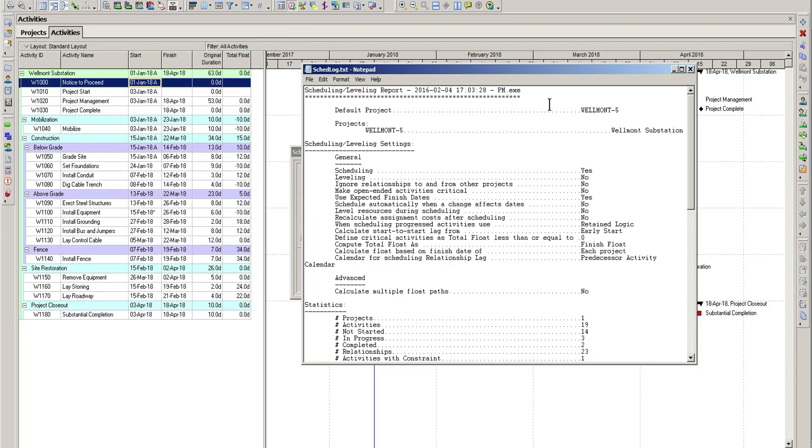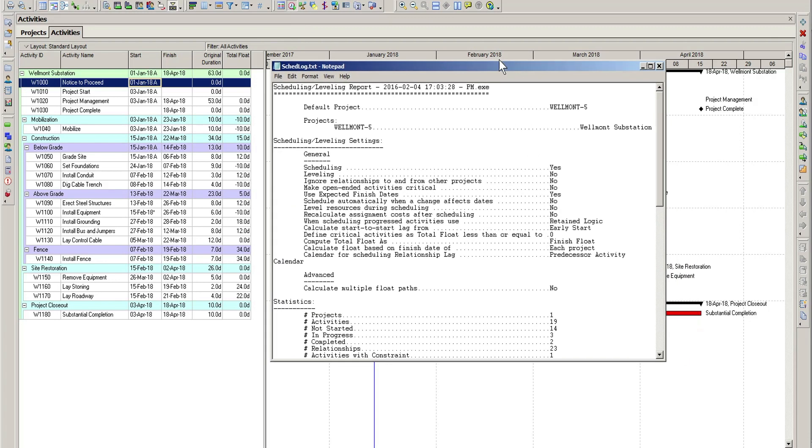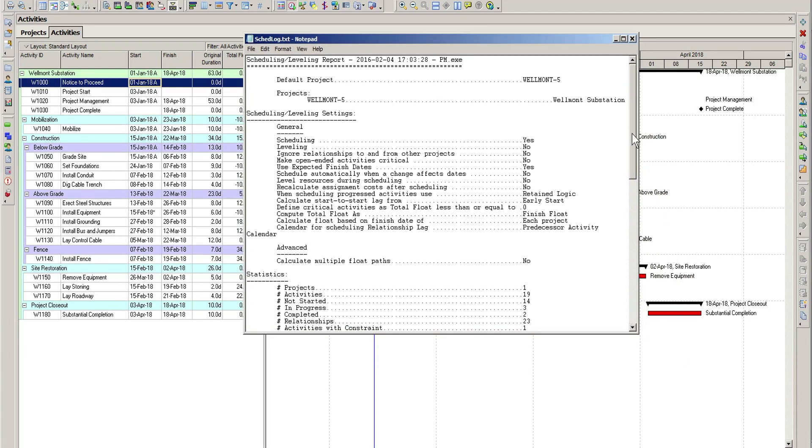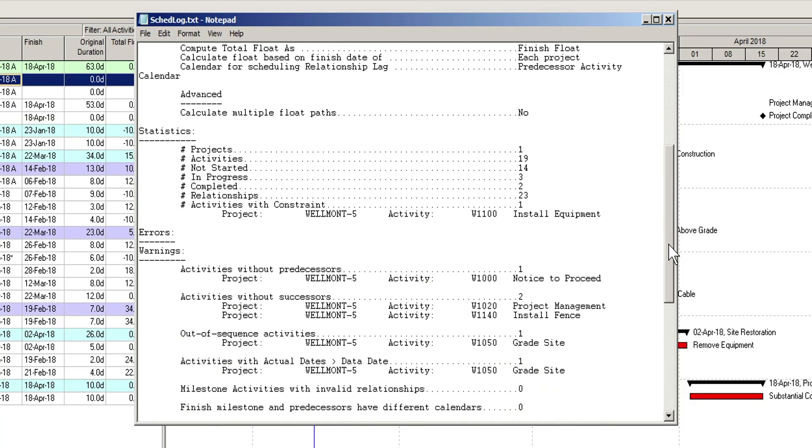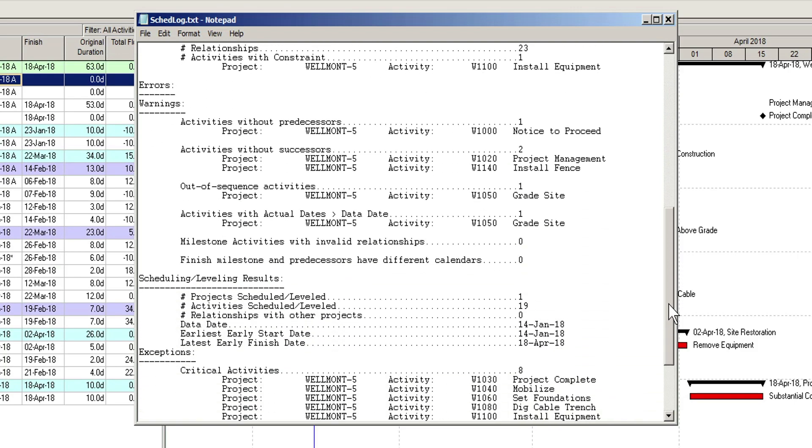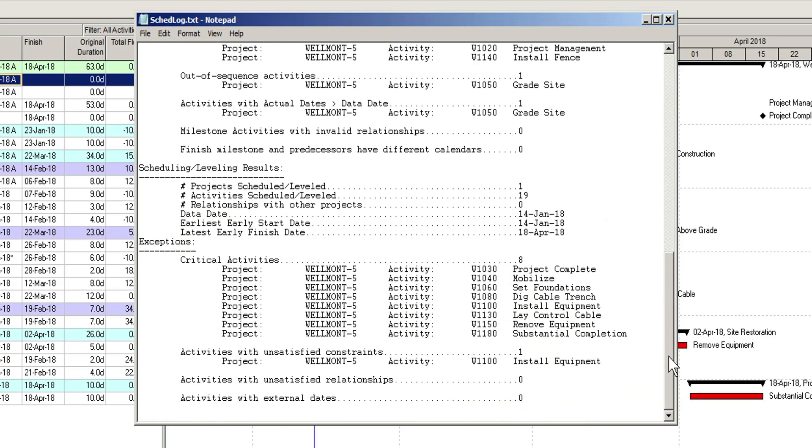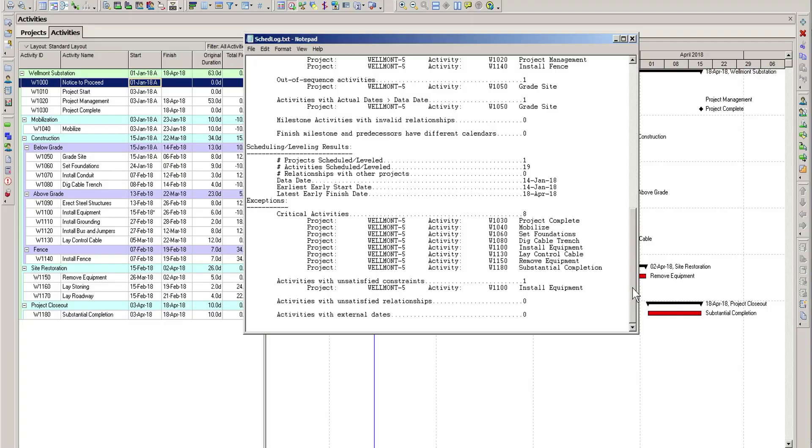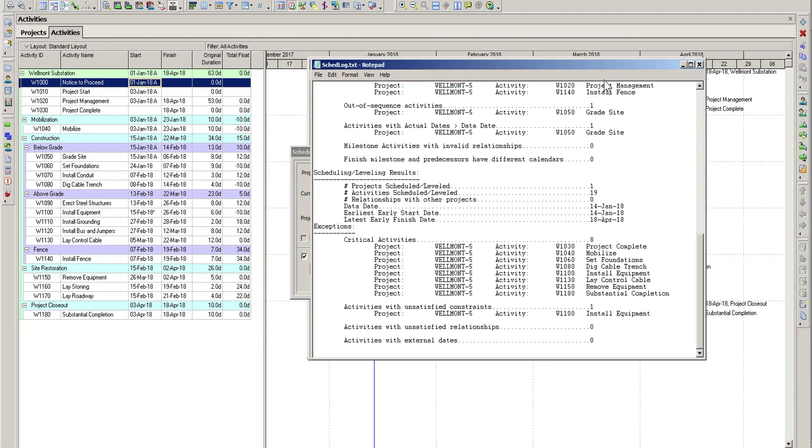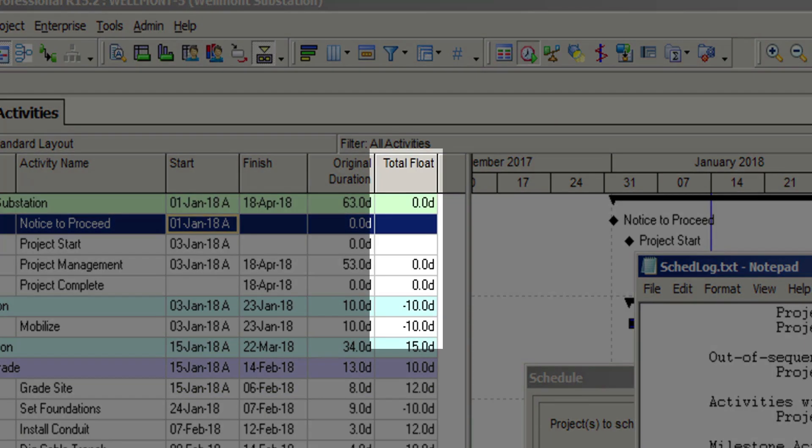For an invalid forecast date, you will most likely see an entry under the Exceptions heading, that there is one or more activities with unsatisfied constraints. You should also keep an eye on your total float field for negative float, as this is a warning that you have potential invalid dates in the schedule.